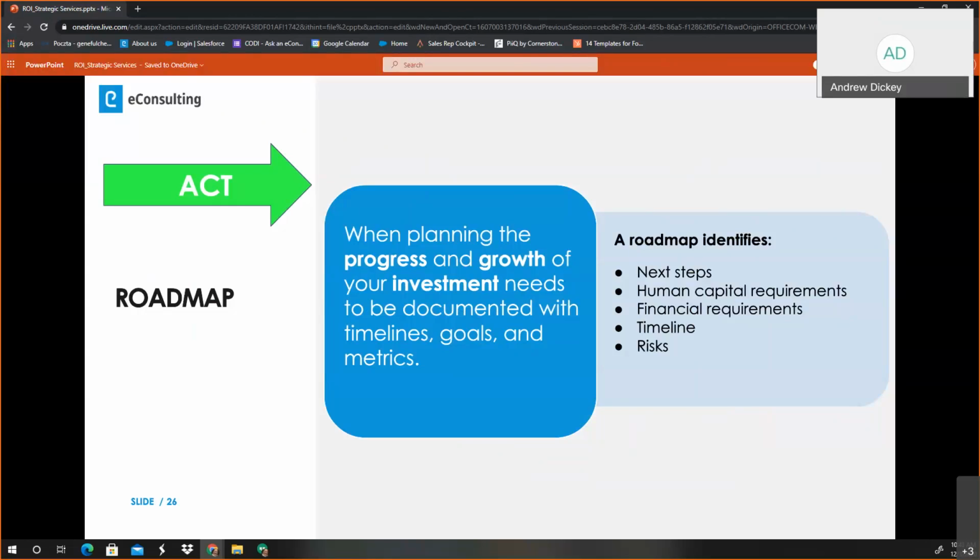Okay, we're at risk because I know that when I talk to your senior leadership team, y'all may be getting rid of some of your diversity team, or you may be changing some of your HR structure, or changing some of your translation structure. If we get rid of your translators, we're going to have to outsource all of our content to be translated by our third-party vendor, which increases our cost and also increases our timeline on launching stuff out.